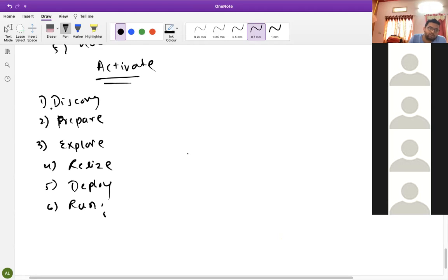Initially, discover means project preparation will start from here only. The people identify the project, what we need to do initially: project preparation level and high level activity, these two things, at the project management level. These people will make a project charter. As I told, these things will be identified in this stage only. The project manager will do this. Initial hiring will happen, and the HR team will be involved in this.